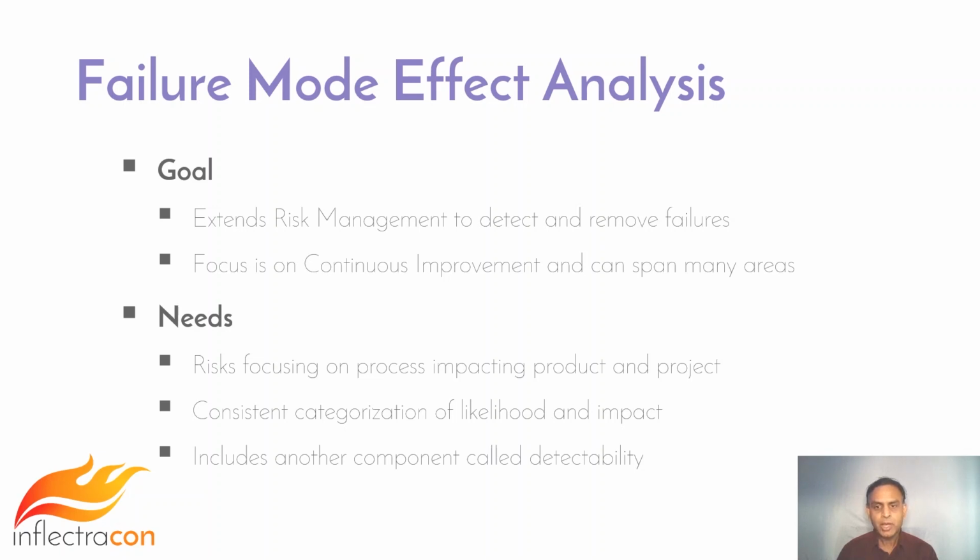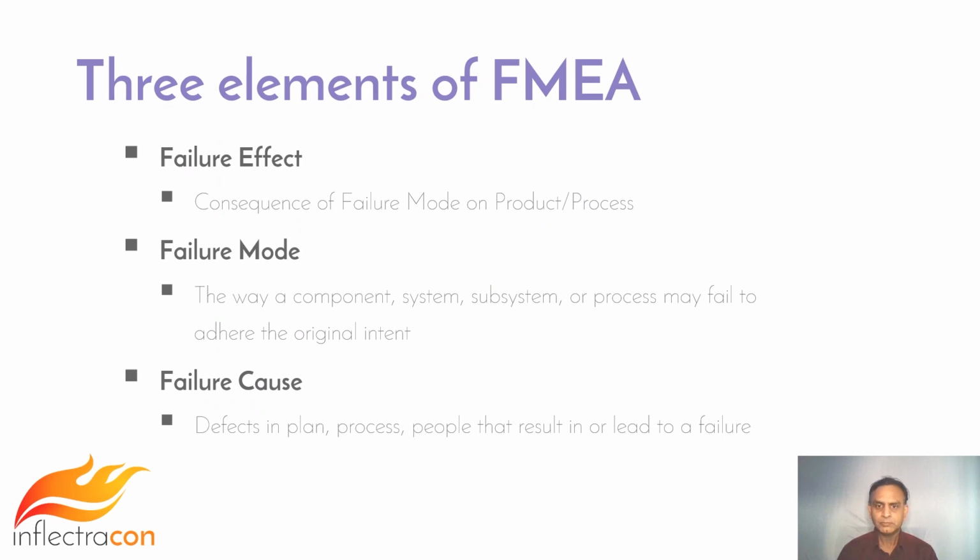So the cost of corrective action is too expensive and requires preventive approaches by focusing on continuous improvement. This could span many areas like design intent, build intent, test intent, and service intent, among many other things. Therefore, in addition to likelihood and impact, the failure mode effects analysis focuses on a third element called detectability.